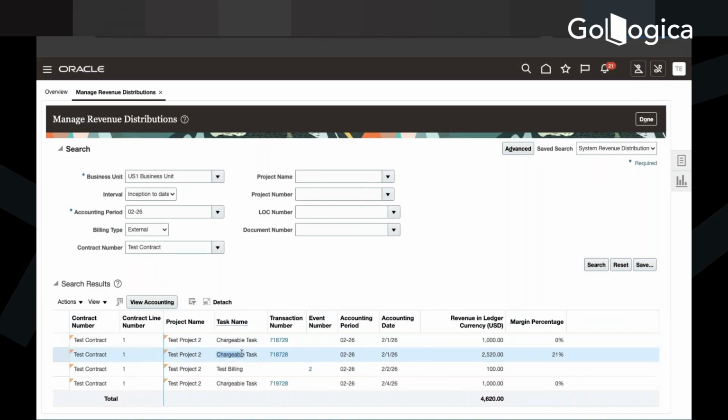And we said in the revenue plan, same as the bill. Yeah, that is what I am saying. But it doesn't mean that the invoicing should be done. They are independent of each other. Even though it is same as the bill, it is going to be the same as the invoice amount only because it is as incurred, right? So when it is as incurred, it will consider whatever rate schedules we are associating to the bill plan.